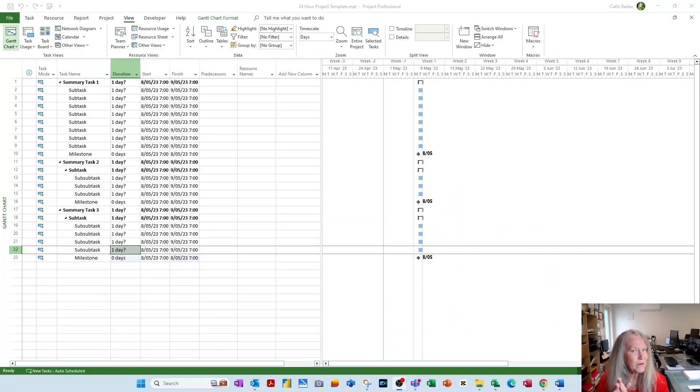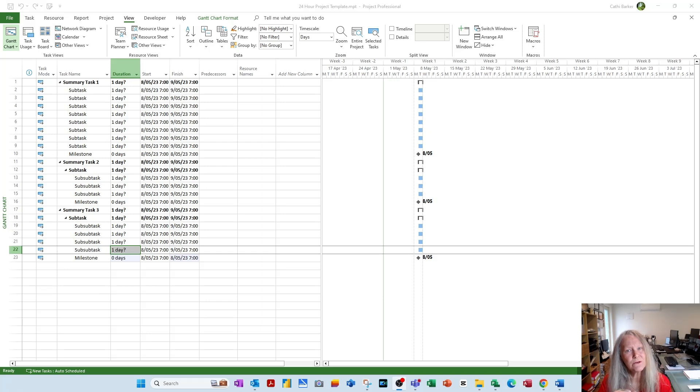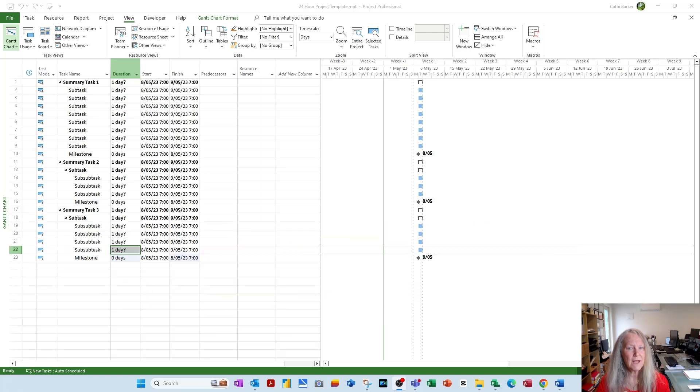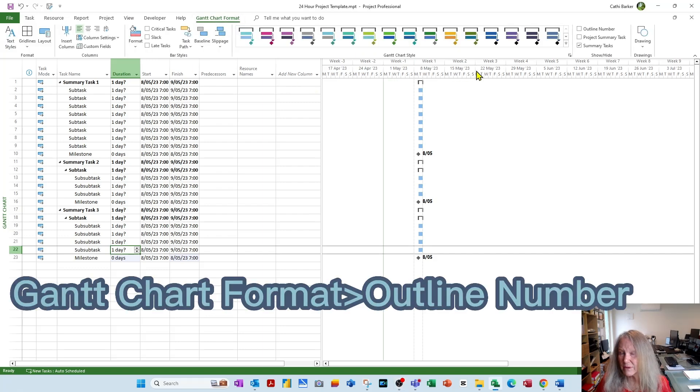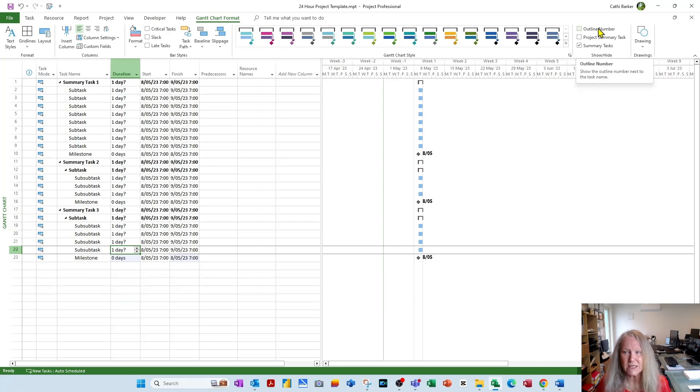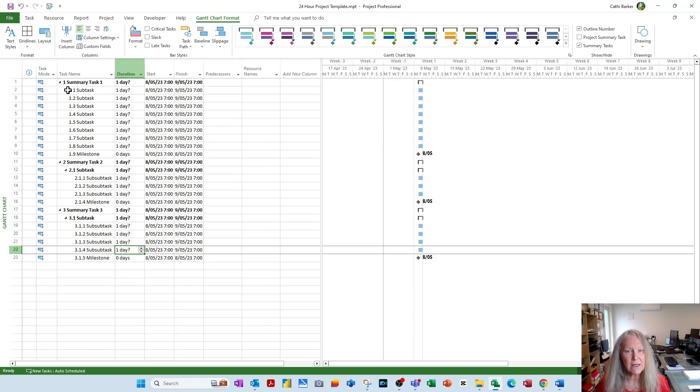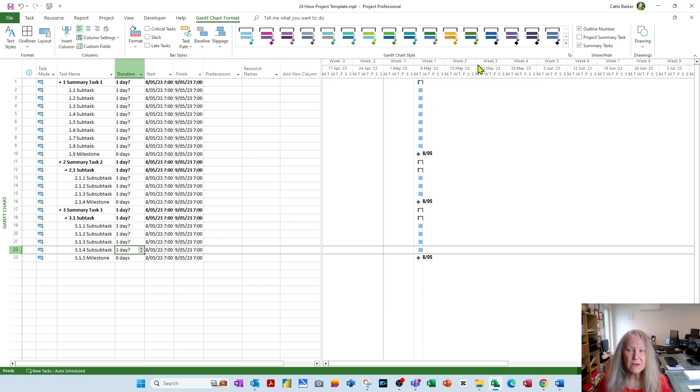But before we leave the topic of outlining in this particular step 5, the other thing that's important is whether we include in our template a WBS column, or whether we turn on outline numbering. Let me start with outline numbering because it's the quicker of the two to show you. If I go to Gantt chart format in the ribbon, there is an option here I can tick called outline number. And when I tick it, I literally can see now an outline number applied to each task. So I can see this is 1, this is 2, this is 3, this is 1.1, 1.2, 1.3. So outline numbering is actually really helpful when you want to see the outline structure of your project.